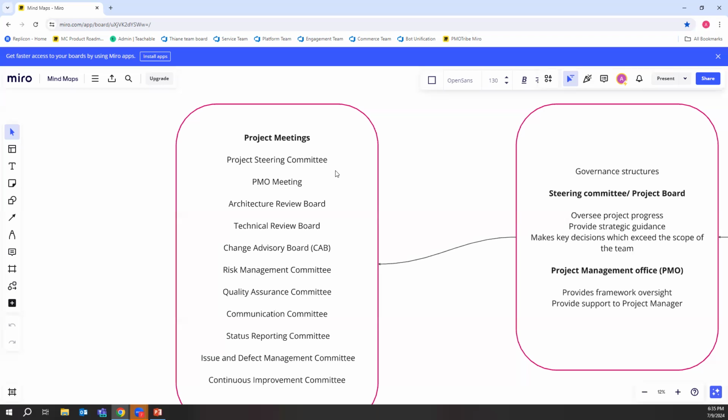So actually go to the exec and say, look, we've got this issue. We're going to raise it in the steerco. I'm giving you a heads up that it is there. How do you want to deal with it? That gives them a day or two to think about it. They might resolve it before the steerco, and you can remove it. There's no need to have it there. Or they can have discussions and resolve it for you. But the principle is, make sure that there are no surprises. Always socialize people before the steerco, especially if you're dealing with a highly charged organization or project for that matter.